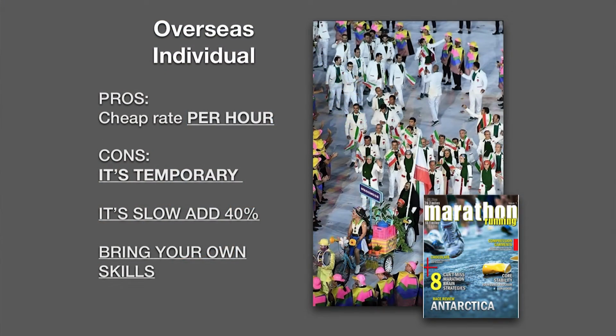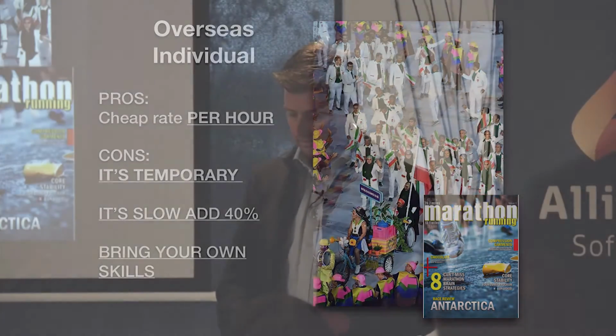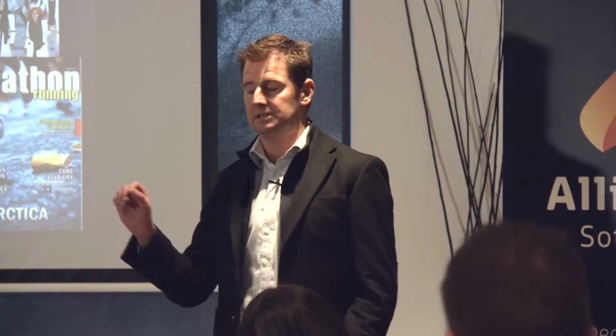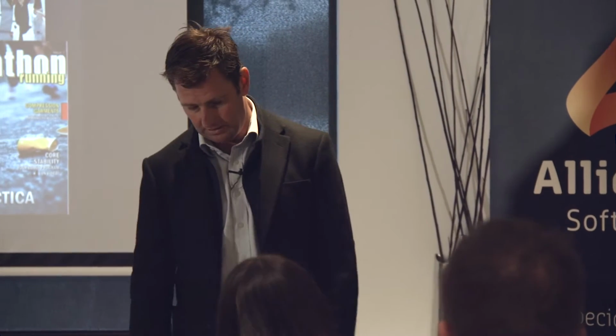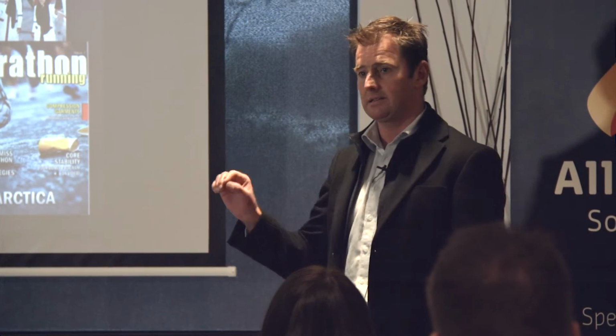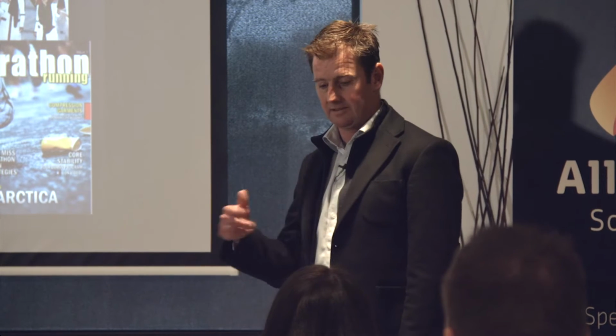So obviously the pro is the cost per hour, but you need to consider that any development project has a suite of staff that support it. We talked previously about a BA, about UX, about design. They're all part of the development process, but you're specifically talking about the developer cost. So although it seems cheap as a rate, the initial price, there are other factors that need to come into play in terms of the overall cost.